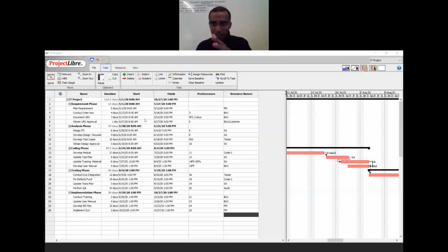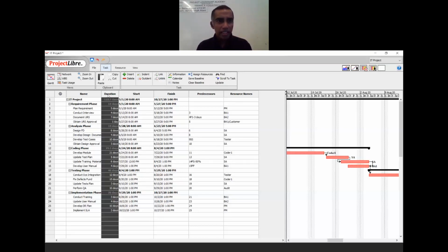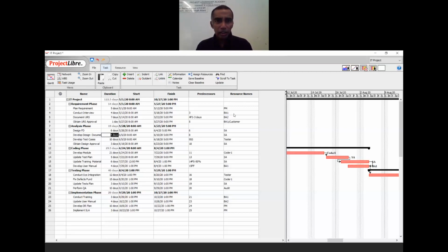Remember that 3 formulas that I mentioned? How to figure out that costing, right? So based on resource name. So resource we already entered already, right? So resource is already there. Next one, we have to enter their salary, right? Monthly salary, so that it will automatically calculate the rates for you. Third one, we need to have duration. And remember, duration is already here, right? The entire duration. So we have the resource name, we have the duration already, but we just do not have the salary information of all the resources, right?